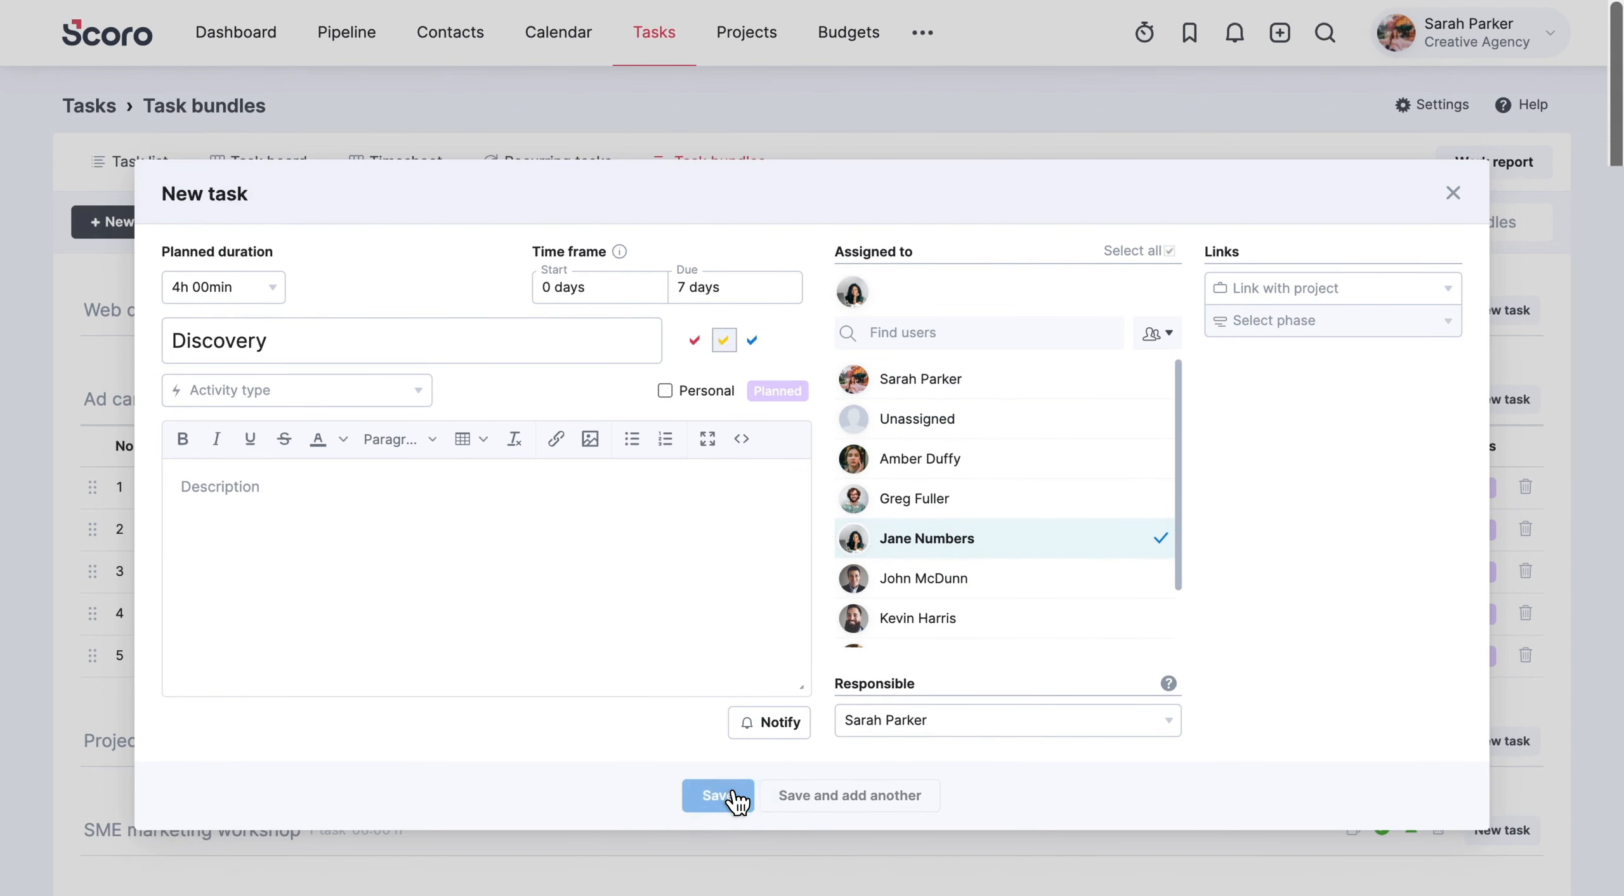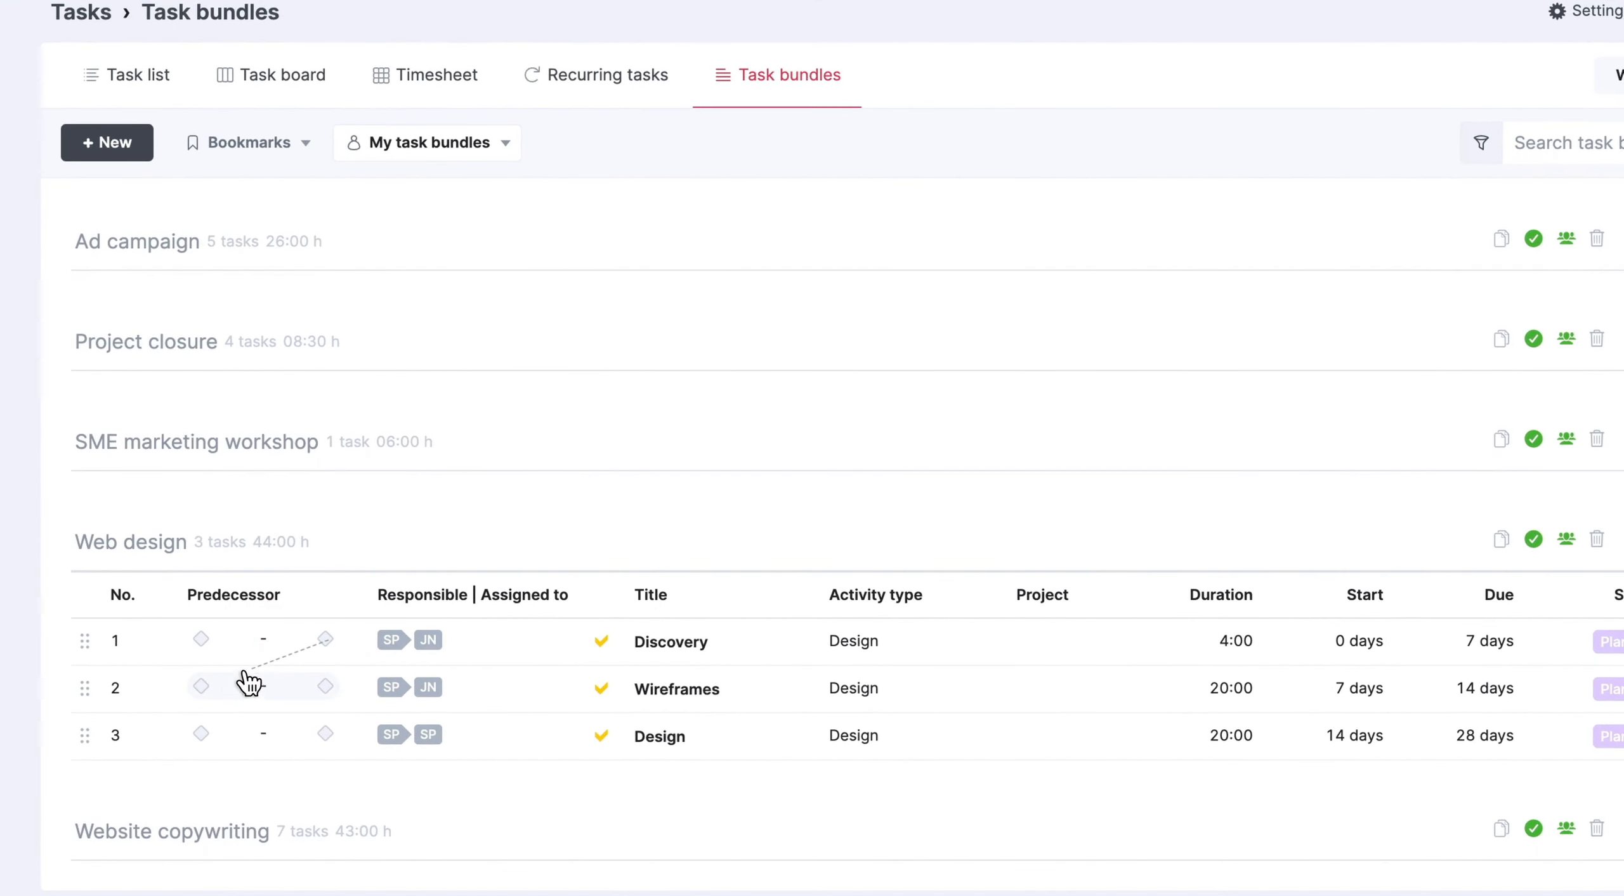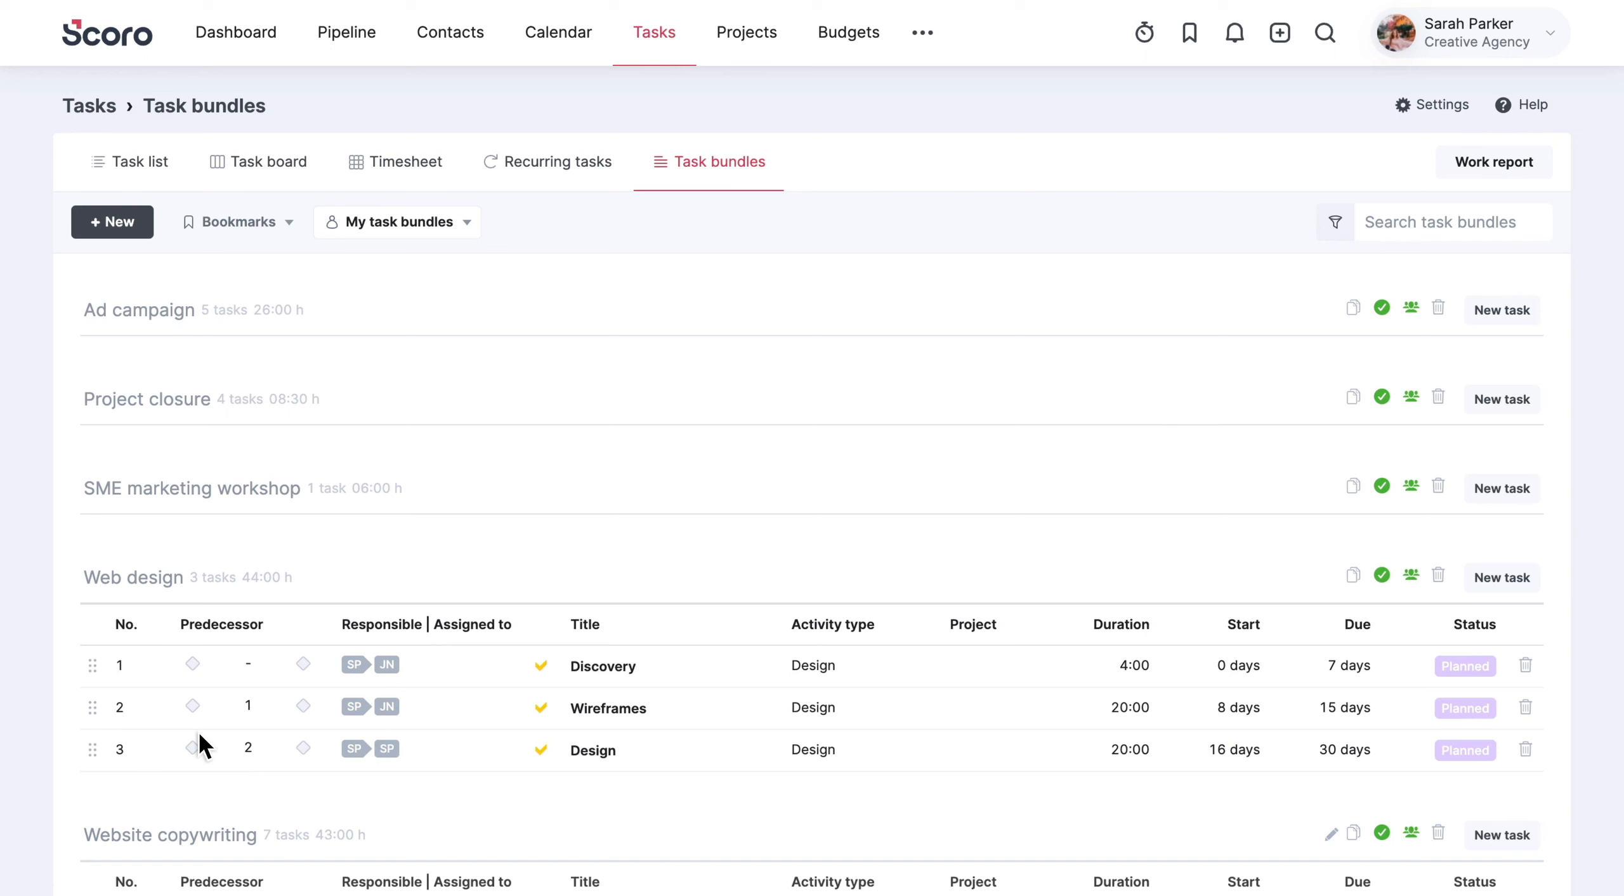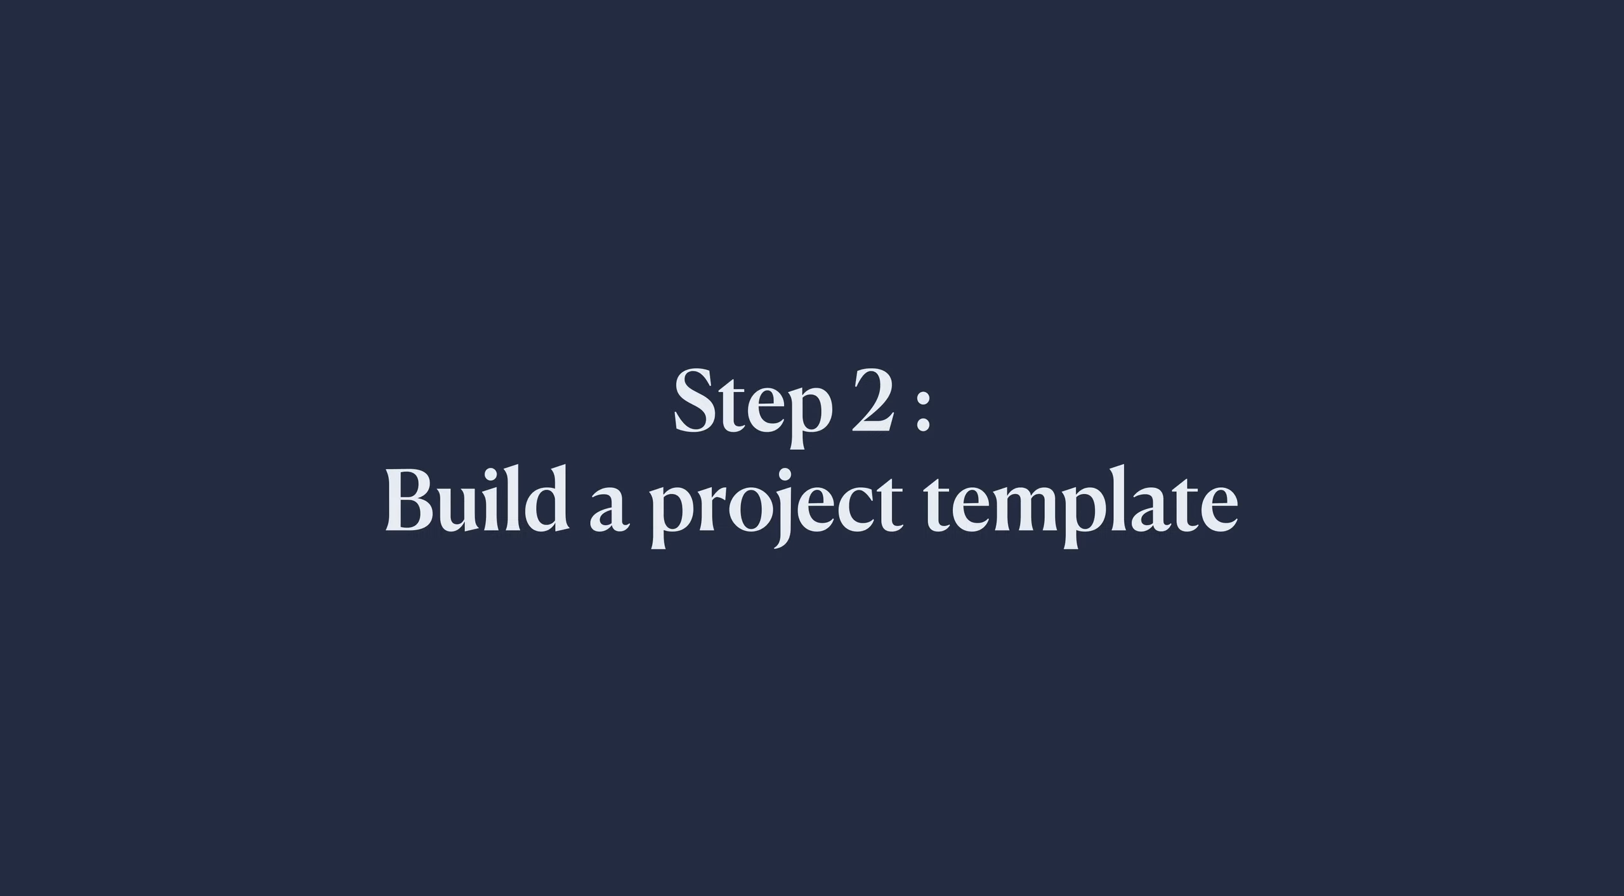Once your tasks are lined up, define the dependencies within the bundle if you know which activities need to be finished before the next ones can begin. Create as many task bundles as you need to create projects or build standardized project templates.